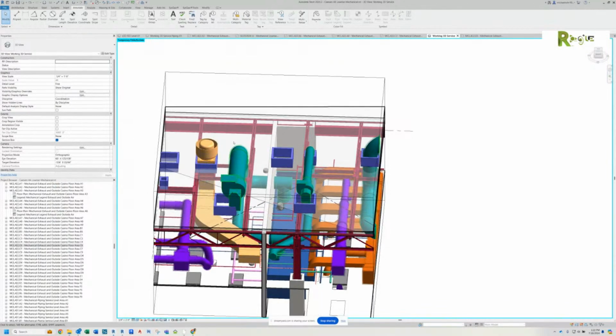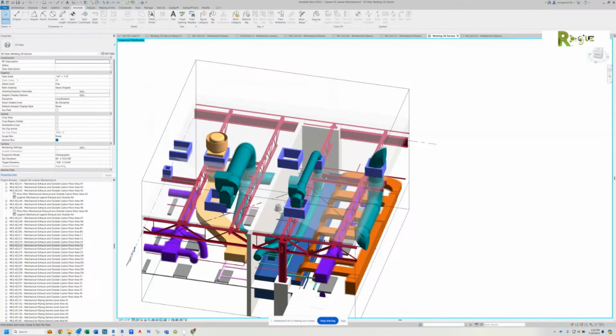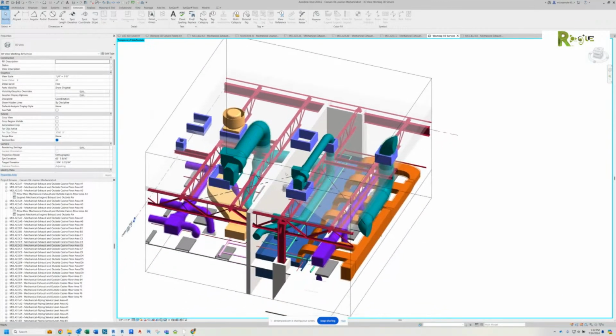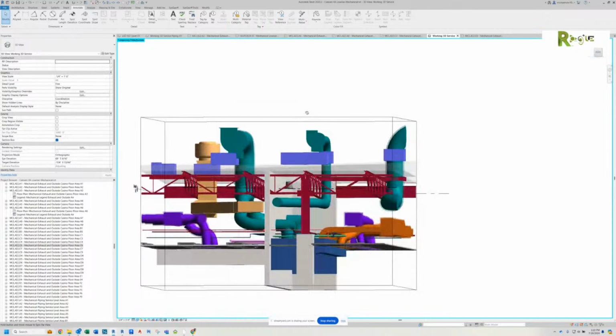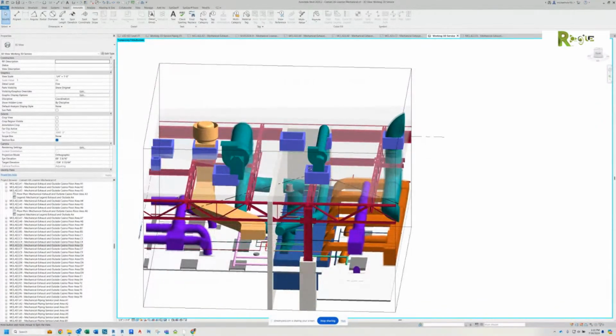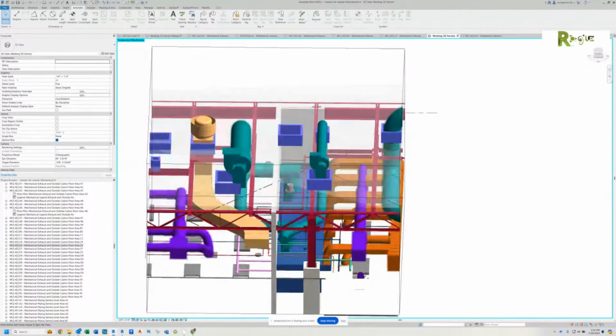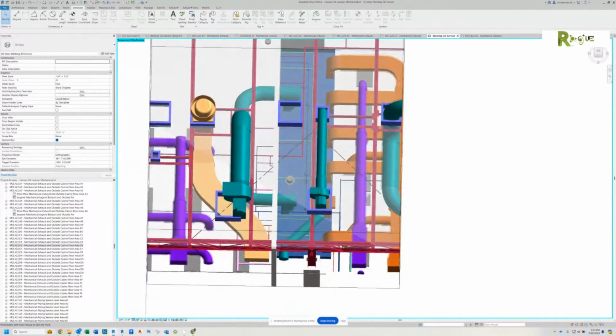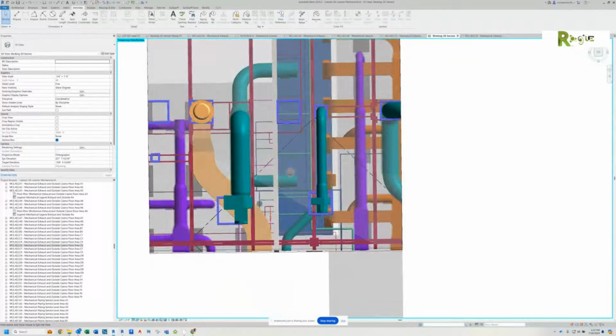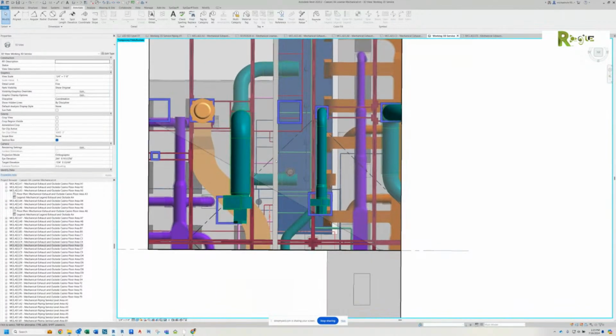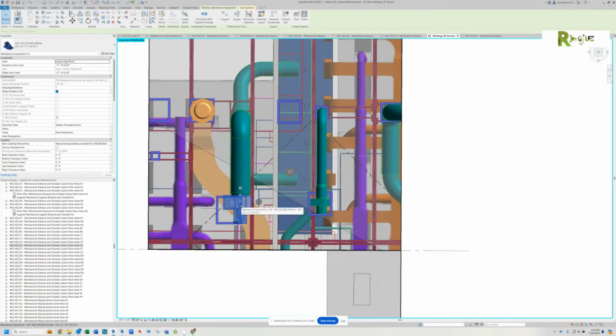All right, so what I'm hearing you say is we need to reconfigure this ductwork and get it through this opening right here. Yep. Right. They're adding all kinds of steel and changing steel so they can put the steel where it's supposed to be drawn. That way we'll have a straight shot out. I think then what they fabricated, all you'll have to do is customize those 90s where it turns back in the wall and shorten those a little bit and come right off that pair of pants and you'll land right in the same spot. Yep. I just hope we had the height to get that pair of pants in there. I believe you do. If we've made the double turn, you definitely will have it.